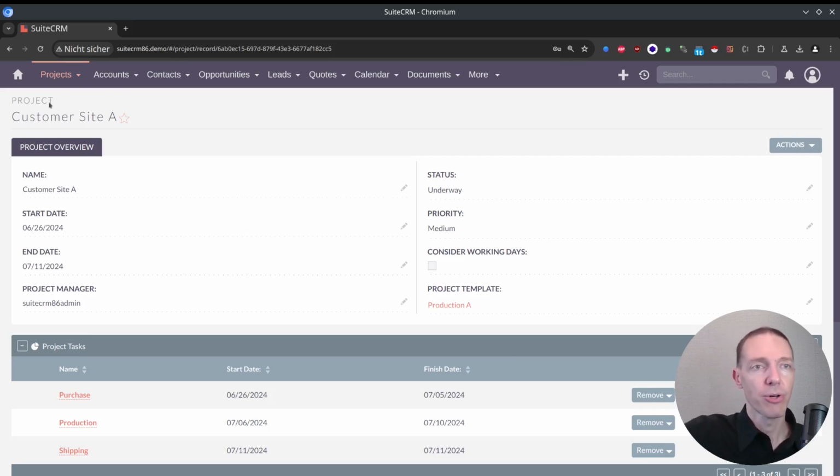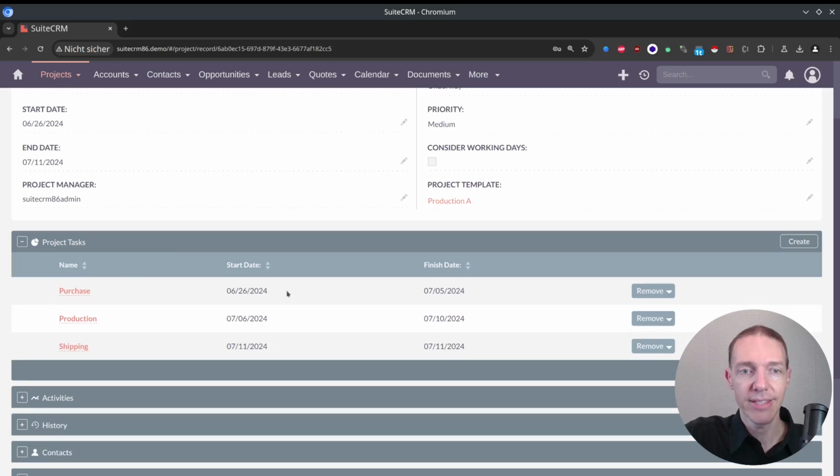And you see, now we're not in project templates anymore, we're in projects. And inside the projects, we've got these here, the tasks. And as you can see, it already automatically created the tasks for us, which is really amazing. And it created the tasks, including the correct dates as well. So here, this one goes from the 6th till the 10th. Probably, how long did I say we need? 3 days or something? Probably it's like 1 weekend day included. And therefore, we have 4 days, but net would only be 3 days because there's a weekend inside.